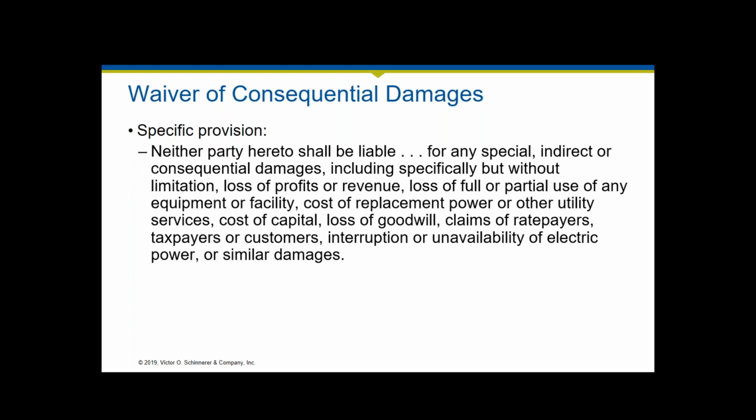Loss of full or partial use of any equipment or facility, cost of replacement power or other utility services, cost of capital, loss of goodwill, claims of ratepayers, taxpayers or customers. This is a very specific provision that is obviously tailored to that particular project. And if you have very specific concerns like that, it certainly makes sense to try and negotiate one of these waivers into your agreement that is very specific.